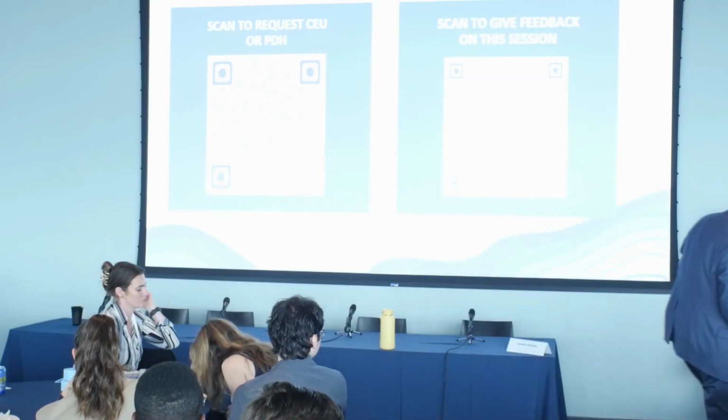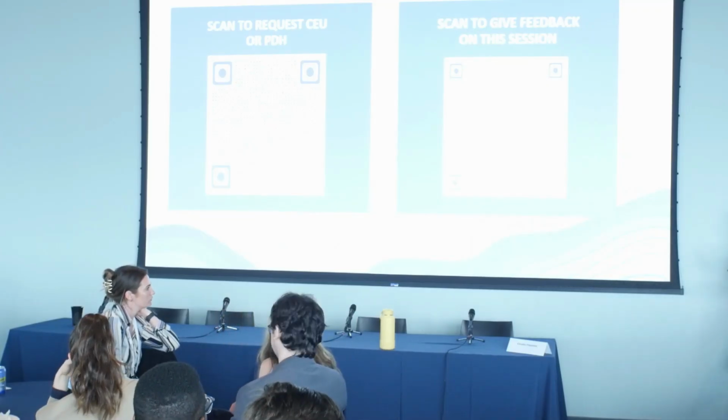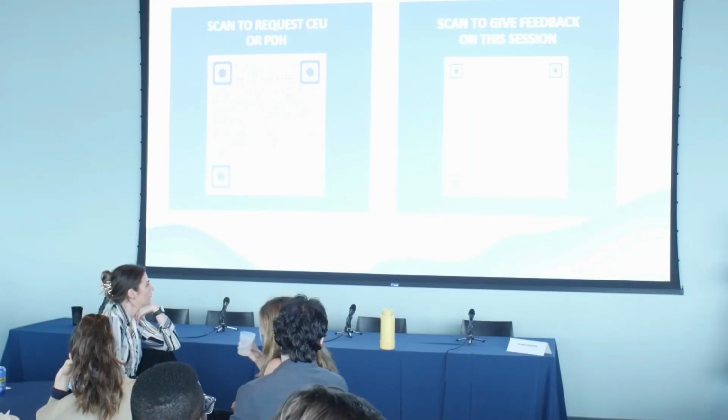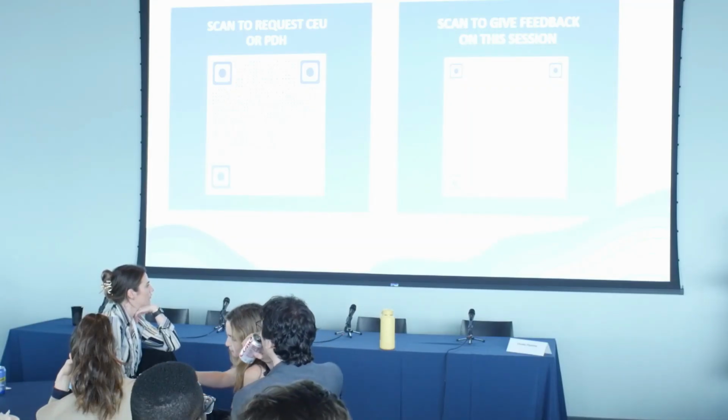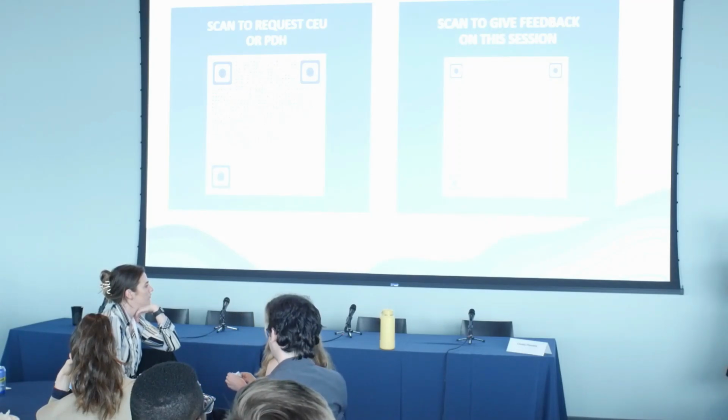That's a great question. So many resiliency projects are funded through federal funding, which the authorities' projects are not. We have bonding capacity and the ability to do that, so we issued bonds for this project. That is because we have payment in lieu of taxes, which is additional revenue that goes from our ground leases to the city, and that we can draw against. It's very complicated. So we issued bonds for this project.